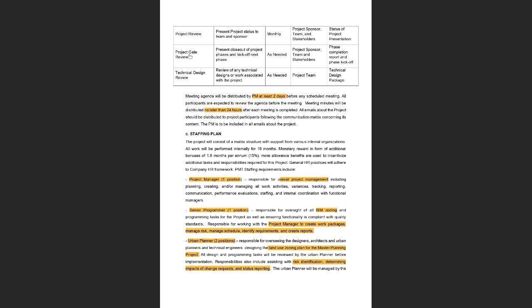This is basically formally closing down one phase of the project and kickstarting the next phase of the project. The frequency will be as needed. When you say in 12 months we complete stage one, maybe after 12 months we can have project gate reviews, right? So in 12 months we are closing down stage one, and then we'll move on to delivering stage two and stage three. So this will be as needed.